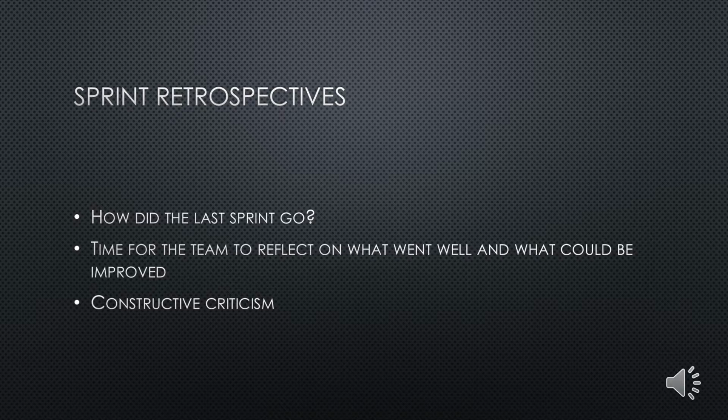Sprint retrospectives enable the Scrum team to reflect on their completed sprint as well as plan for future sprints. These meetings normally contain most of the stakeholders like the sprint planning sessions. The team will go around to each team member and ask them a few questions. What went well in our last sprint? What went wrong? What can we do to improve moving forward?